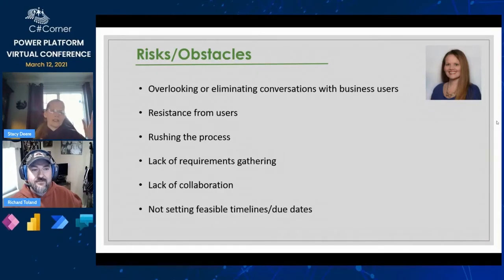But then as things go through the project, you start realizing the other things that you needed by certain dates are not coming in on those dates, which means that your go-live is no longer feasible. Richard's laughing at me because we're dealing with this right now, but we just had that conversation. You have to make sure you're staying on top of that.